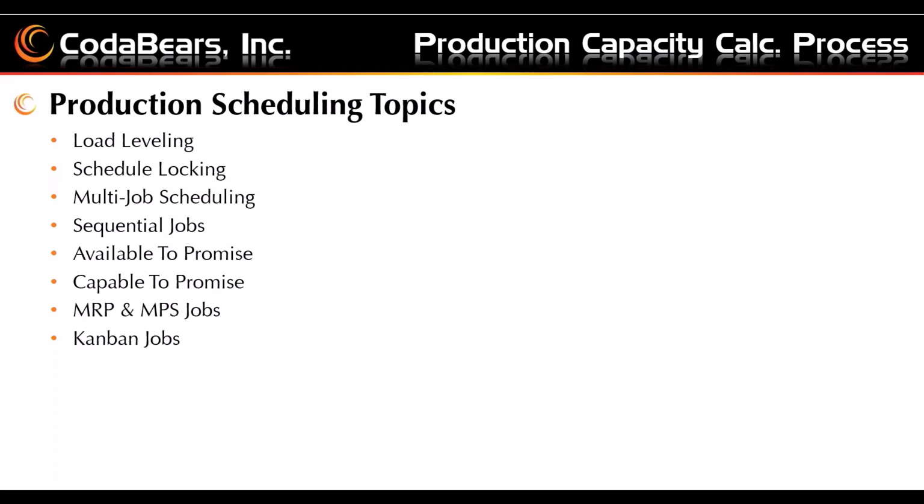Epicor is going to assume that your purchasing department is going to bring the materials in for what the jobs are scheduled. Now, bless their pointy little hats in production, if they schedule a job that's before the lead time on a material, shame on them. They shouldn't be doing it. They should be following the lead time on it, or mark the material as a constrained material on the part setting. Epicor will follow that rule when it does its scheduling for you.